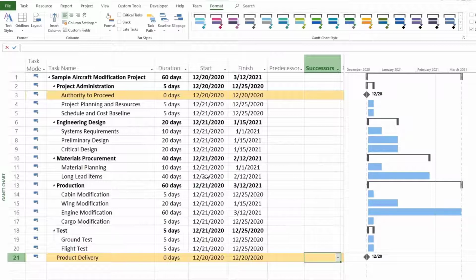We also need to know that it is scheduling best practices to never put task links to summary tasks. Doing this will cause so many issues with the flow of your schedule and can get so bad that it causes circular references that are hard to trace. You want to avoid that type of headache as much as possible because sometimes it's really hard to solve even for a very expert scheduler.